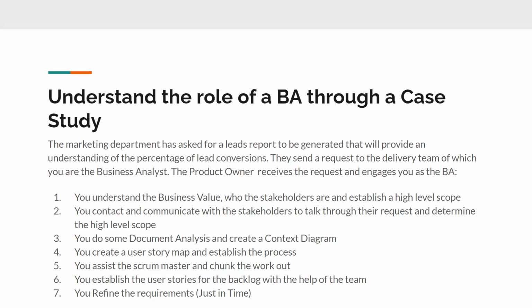And when I say just in time, remember, Agile is all about change. So when the output is presented to your customer, you basically expect to see changes, right? So that's where you come in as a BA and you would document those changes just in time. What becomes critical is that you document those changes from the original baseline, just so folks know where things are.